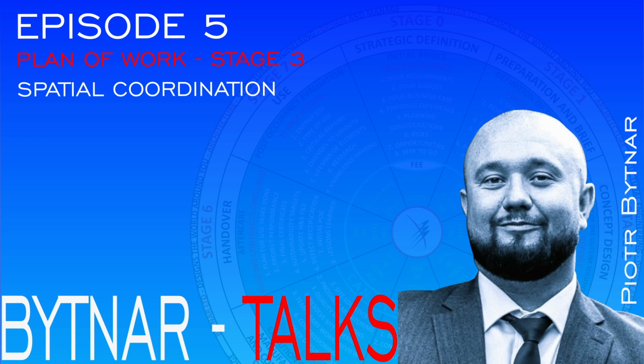We need to identify specialist items crucial to the project, and they should be programmed. Their design and coordination should be programmed in the execution plan of the project, so all these aspects can be coordinated prior to designs hitting the construction phase. This includes specific structural elements, often detailing of structural systems like steel connections, reinforcement detailing, glass structures, balustrades, stairs, or HVAC, heating, ventilation and air conditioning, overground plumbing and mechanical and electrical elements.